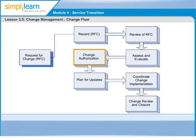Work orders are issued for the build of the change and carried out by implementation groups. Change management coordinates the work performed with multiple checkpoints, forwarding approved changes to the relevant product experts so that they can build and test the changes, and create and deploy releases.